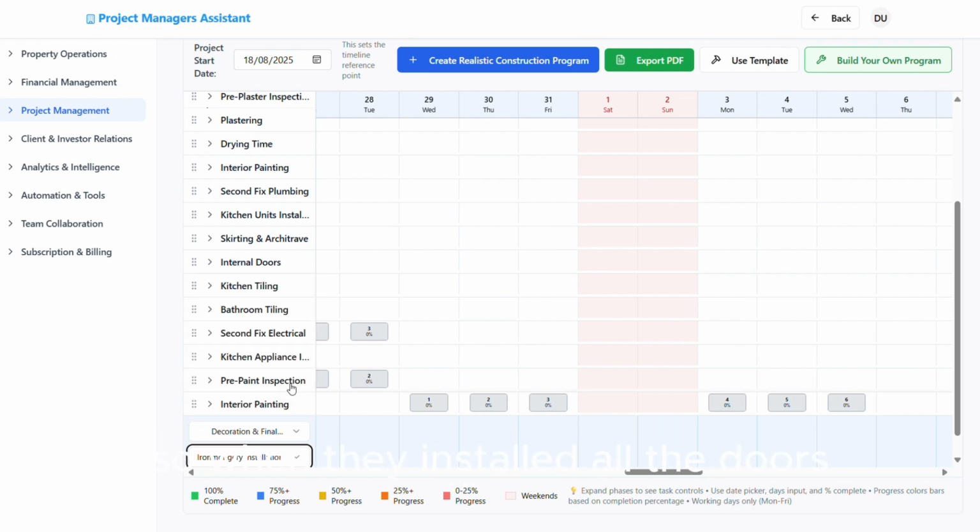When they installed all the doors, fitted all the doors at second fix stage before they were decorated, they can drill all the latches out, fit all the handles if they want to make sure everything's working, and then everything gets taken off and put in a kitchen drawer somewhere, because the decorator when they come in will just paint everything or spend time taping everything up.